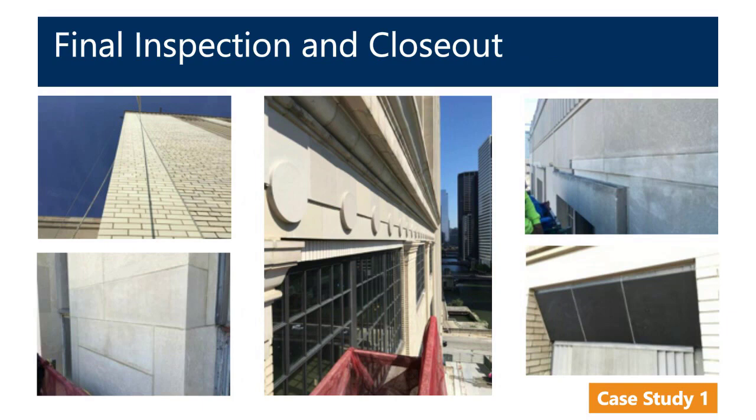Earlier on, you complete an inspection for a type of material, and the AE inspects it. If there's modifications to do, if something didn't look right at the end, you can communicate with the contractor and say, next time when you install this, let's tweak this a little bit, or let's pull this out a little bit and modify and tweak this final appearance so that we're happy at the end of the day, and you're not waiting until the middle of the project to tweak those. You're able to get that done right away to make sure that the actual final repair is appropriate for the initial intent and what the owner is looking for.